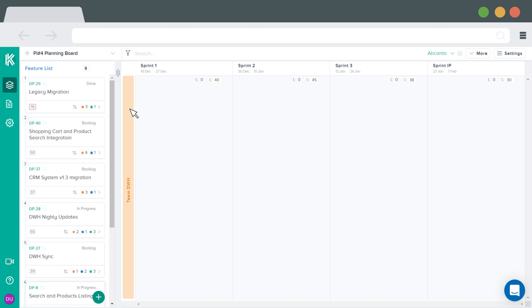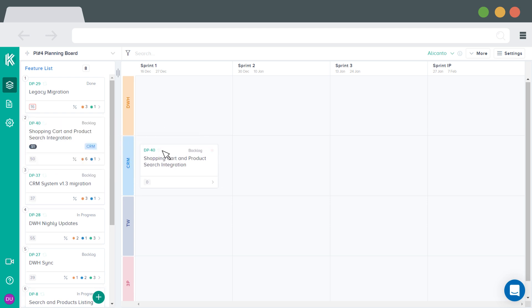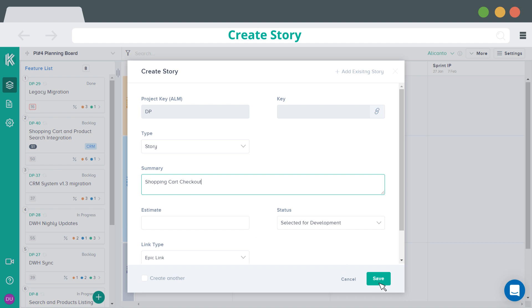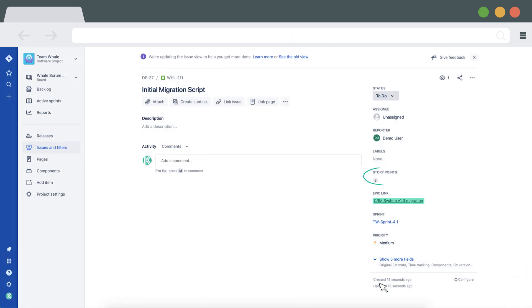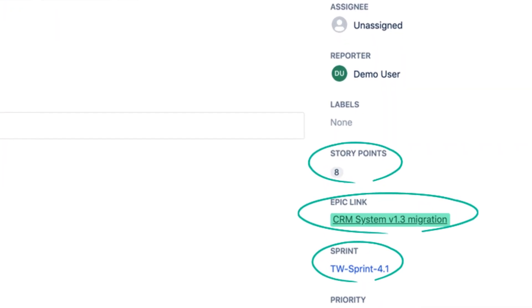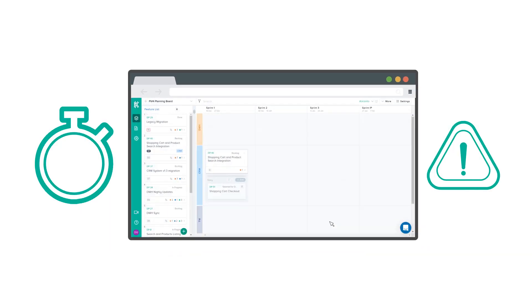Scrum masters of each team can go to their team area and set the capacity for each sprint. Teams can start the planning by pulling the features from the prioritized program backlog into a sprint, expand the feature card and can create stories by providing story title and estimate. Stories will be created instantly in Jira. It will be linked to the feature and placed in a sprint, saving valuable time for everyone and reducing the chance of errors.